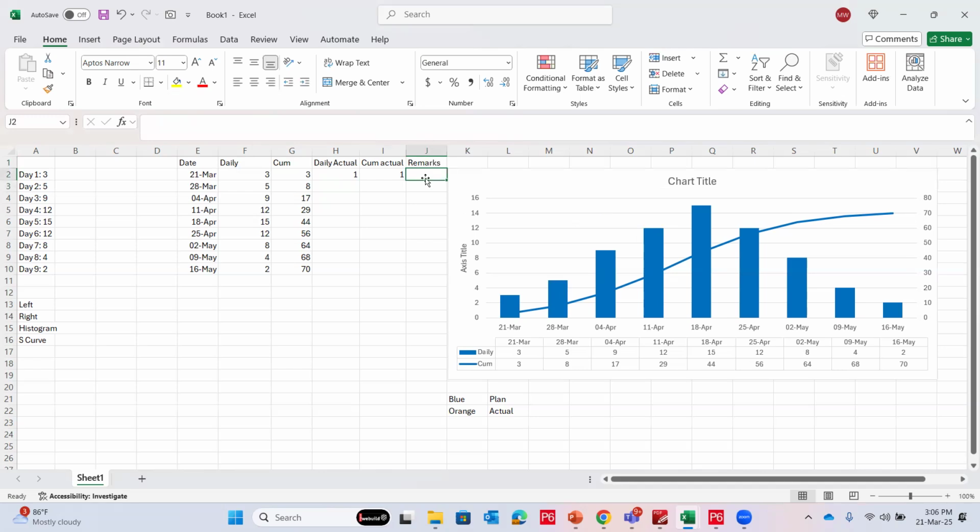Was it the shortage of material? Was it the manpower? Or what was the issue? Because I have to record these issues all the time, I cannot just wait and think that I will remember after 6 months why I did one column instead of three. So therefore, it's very important. You have to always record the things, that okay, I did one. It can be my fault as a contractor, and it can also be the client's fault. Maybe they have not given me the design. Maybe the site was not ready. Maybe there was some issue with the client. Maybe there was rain. Rain you can also claim in some cases because it comes as force majeure.